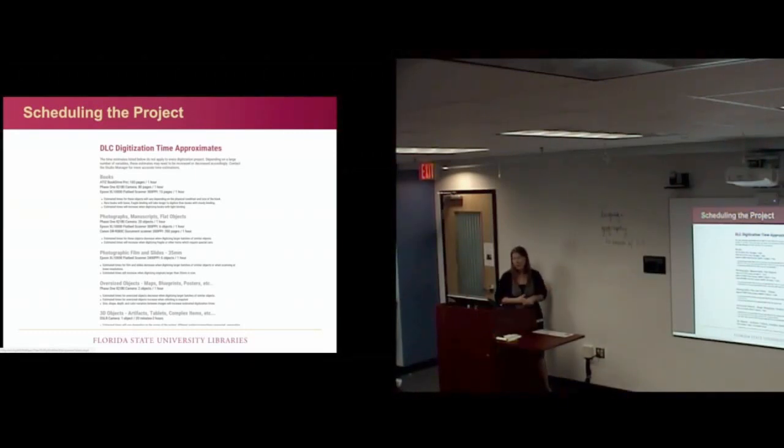My metadata librarian has a similar document for how long his work takes. Metadata is a little trickier because Matthew, the librarian, is often supervising other people doing that work. We have students that are really, really good at metadata creation and other students that aren't. So sometimes that's actually harder to estimate how many hours that piece of the work might take versus digitization, which is pretty finite. Our staff's really good, and these numbers are usually spot on when it comes to actually planning for the project.